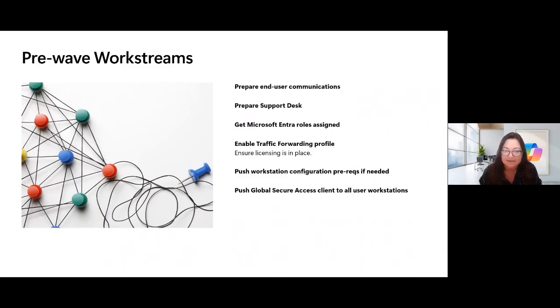do. These end user communications are crucial, and you may want to create several that go out at different points in your deployment. For example, you might want to send one out early to announce the project is happening at all. And then another one right before a particular group of users is onboarded so that they know it's happening to them now. And then another after it's done so that they know it's already happened and what they need to do if something has gone wrong.